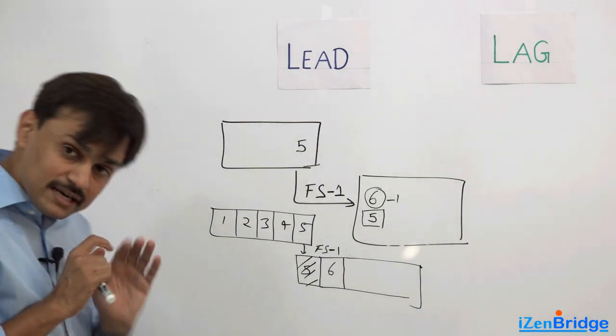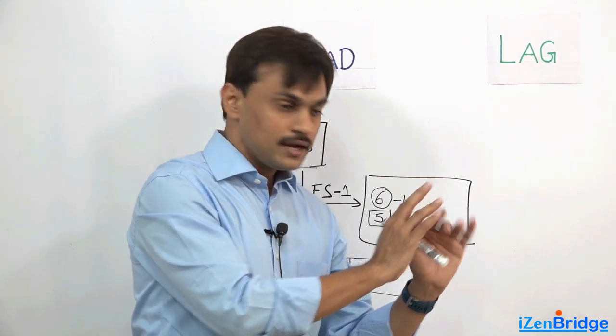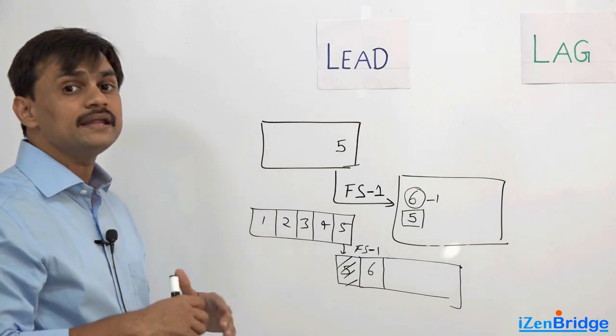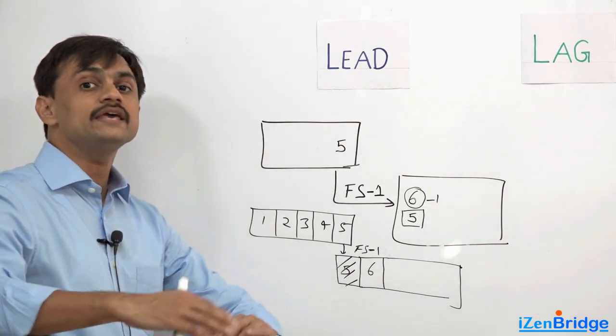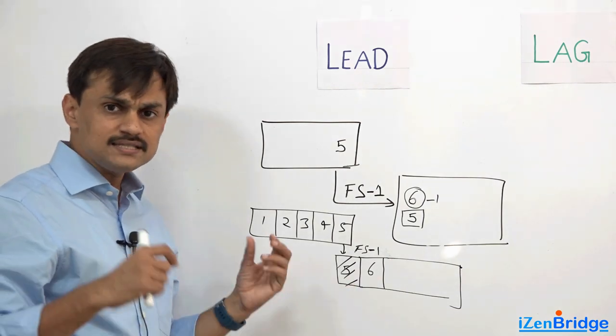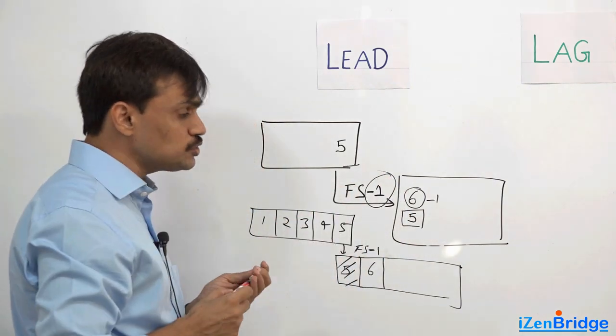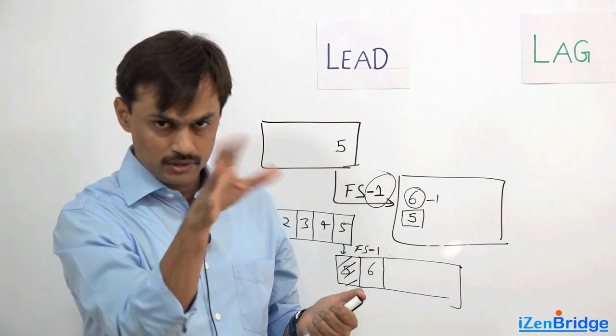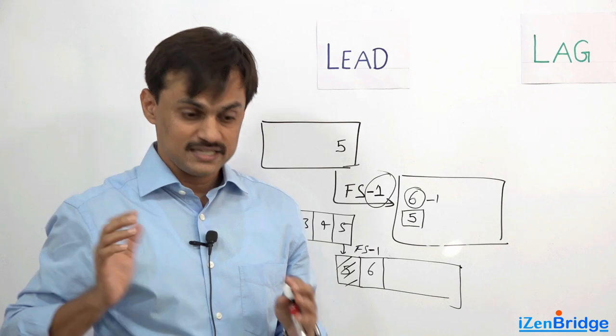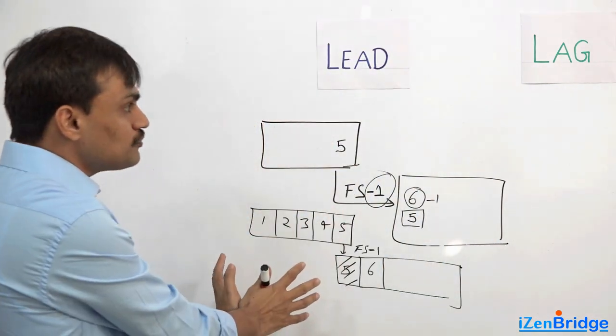Leading means have a relationship but lead, go a little bit fast. Now this example I showed with finish to start, but it could be similarly applied to any of the other four relationships. It is just whatever the number of days you want to lead with, you need to reduce the start time or finish depending upon the type of relation you are evaluating by those number of days. You will be leading, you will be a little bit fast, and exact opposite of this is lagging.